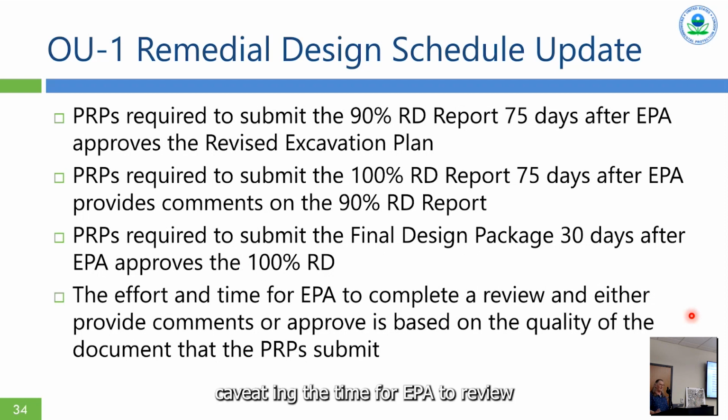But, again, caveating the time for EPA to review, for this site, we've tried to do relatively short 30 to 90 day review times. We're hoping to do that in 60 to 90 days, but it's going to be challenging. And it totally depends on the quality and completeness of the documents we receive and how easy they are to connect the dots.